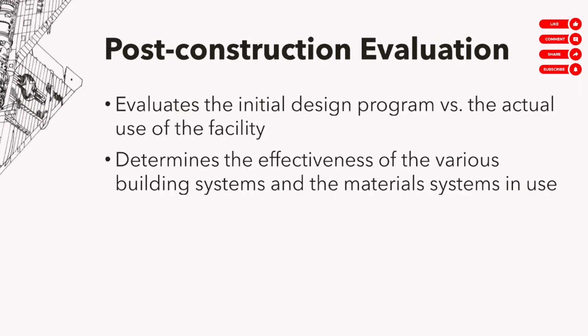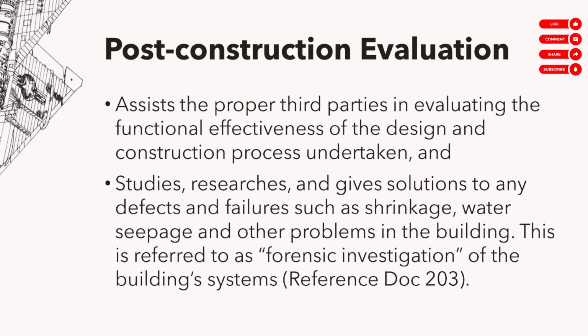Now, that's part of post-construction evaluation. Another thing is determining the effectiveness of various building systems. For example, during design, the consultant convinces you to buy a very expensive type of air conditioning system. They tell you it's expensive at the start, but in 5 years it will pay for itself. Because it saves so much electricity, even if you paid more in upfront investment, you'll recover it in operational costs. So ideally, somebody is monitoring that. Somebody has to check: is it really effective? Are you really saving that much per year to offset the cost of the initial investment? So that's part of post-construction evaluation.